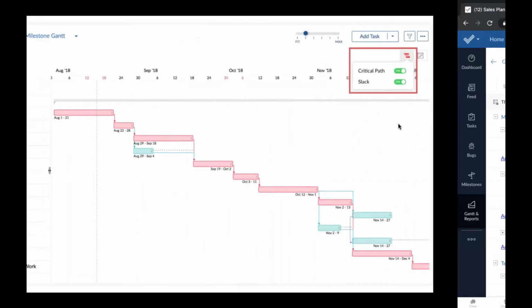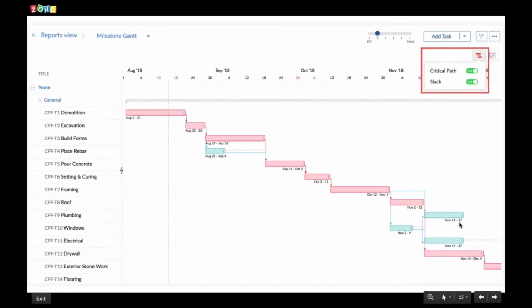And that's what it looks like. It's going to highlight the critical path in red for you, and the slack is determined by dotted lines. If you notice, this task here does not have a dependency tied to a critical path, so it's going to be given some slack, because the one above that has a longer period of work. So that's the one that can cause the delay. The other one, as long as it's finished right when the longer one finishes, it won't affect anything. So you get a few days of slack here, and then this is the actual path itself.